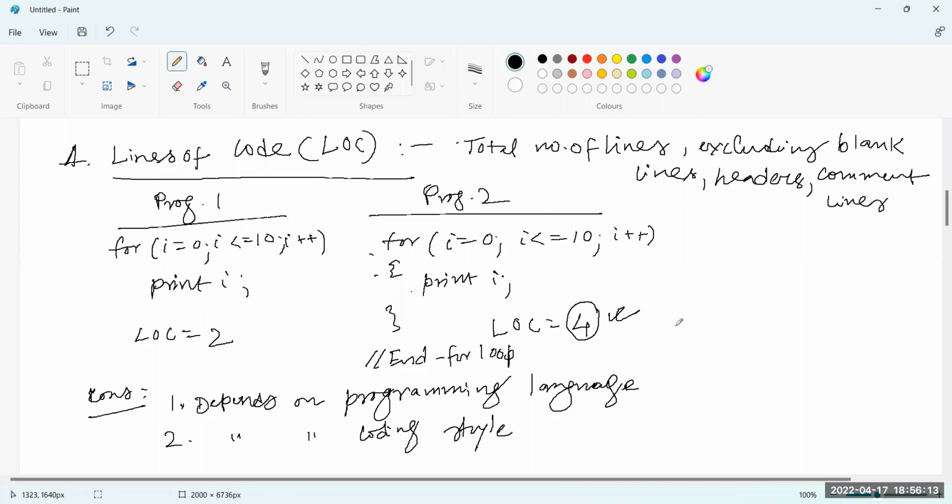But if you reduce your code, your lines of code is less, and again the size of the project depends on the lines of code. So the size of the project is less, which means your effort will be less. So the project manager will think that you have given less effort. That is also another thing. Of course, your target is to produce this with less code. But that is the drawback here.